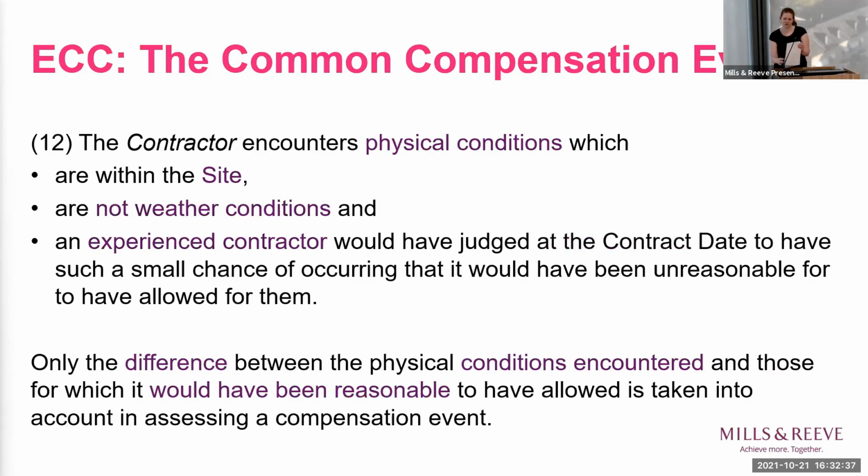Turning next to physical conditions. Notice the drafting. They must be within the site. But obviously in the NEC, ECC, the site is not the only area we're talking about. There are working areas, but this is much narrower. It's just a site. They cannot be weather conditions.